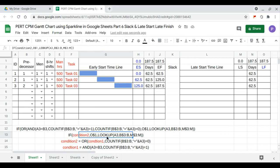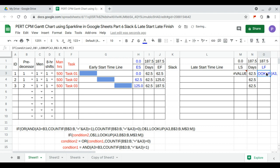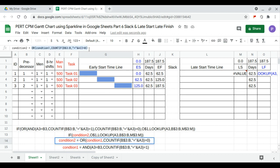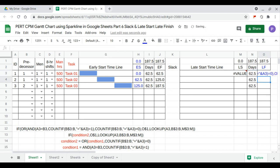For the late finish formula, we start by copying the first formula and pasting it. Then we substitute condition two, which is OR of condition one comma COUNTIF of B dollar 3 to B equal to A3. We copy this formula and replace condition two with it.